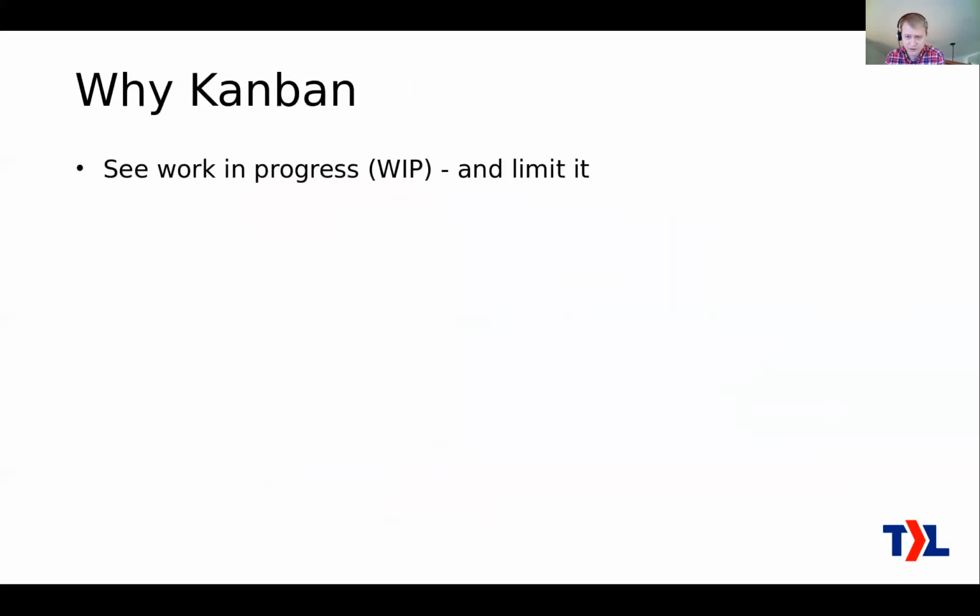Okay, so what are the benefits here? Being able to see the work in progress, meaning stuff that you've started and haven't finished yet, and especially being able to limit that so that you don't get too much of it, because that's one of the main things that will slow you down. And you need the boards to be able to see that, the Kanban boards. Okay, so that lets you be more responsive. When you don't have a lot of work in progress, you can change directions when things come up, and make sure that your customers stay happy, because you don't have 40 things per technician already started like we did.